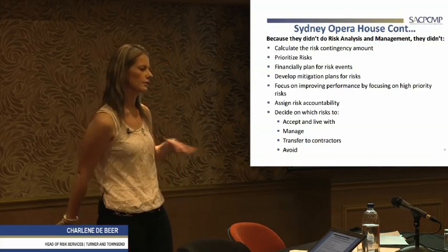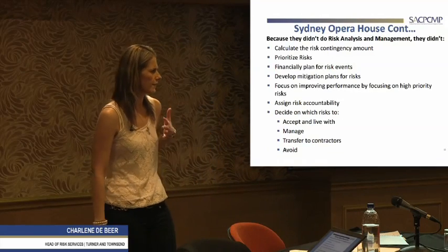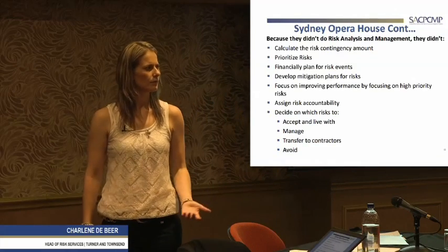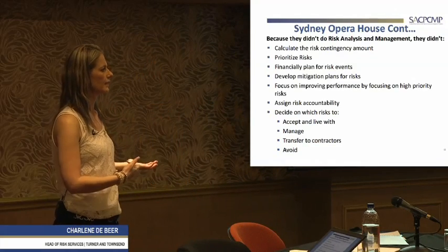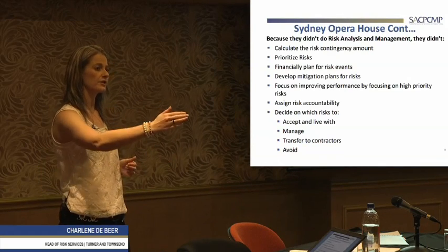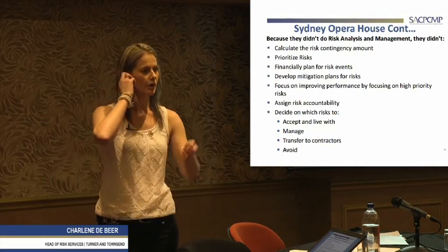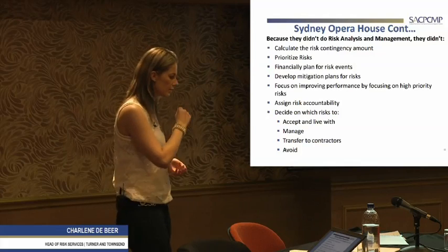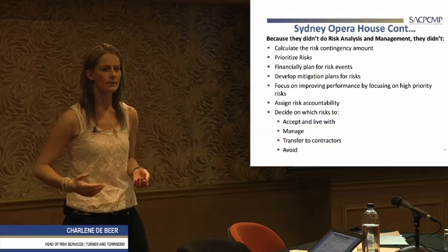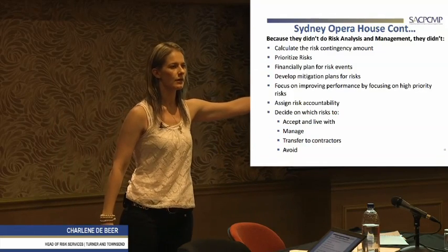You can claim back and say, Mr. Contractor, you'll finish it at your cost, because you're running late, I'm paying for it, which is fine. But I'm going to tell the contractor for every month you're delayed, I'm going to charge you my capitalization costs. So at the end of the day, we can't just, sorry? It's called penalties. But it's also capped. So if it's capped at the contract value, of which it's usually 10%, for example, but a month in overrunning capitalization, they might lose more in revenue than what they could on a performance or a retention guarantee.